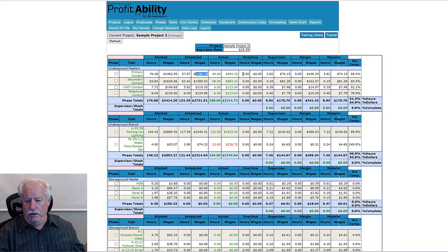If, excuse me, if you have any overtime logged against your project, it'll show up here. Now, the program automatically starts charging overtime for any employees who work over 40 hours. Whatever project they're assigned to work, when they cross that threshold, those hours will be allotted to that project. So it's automatically going to charge your time and a half.